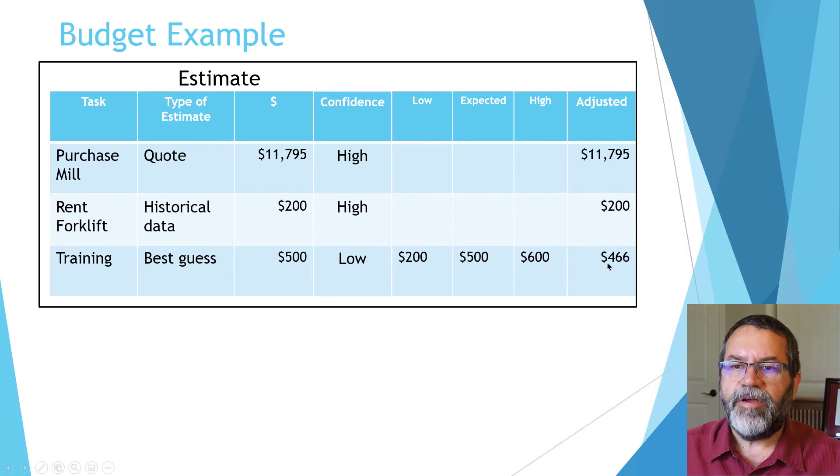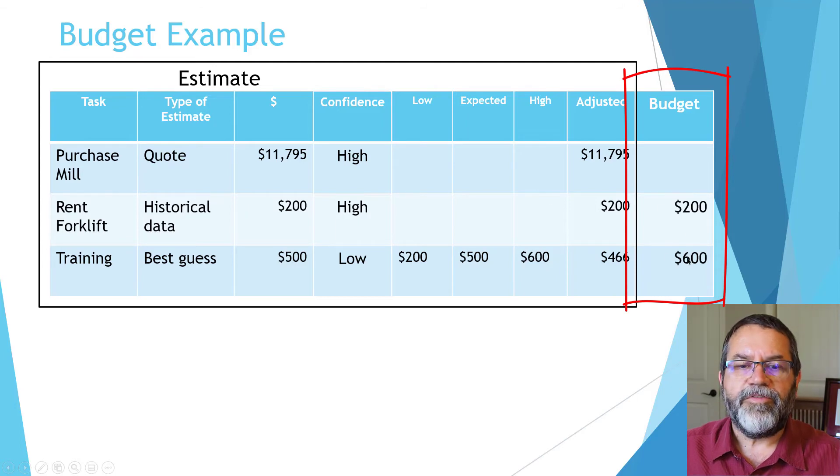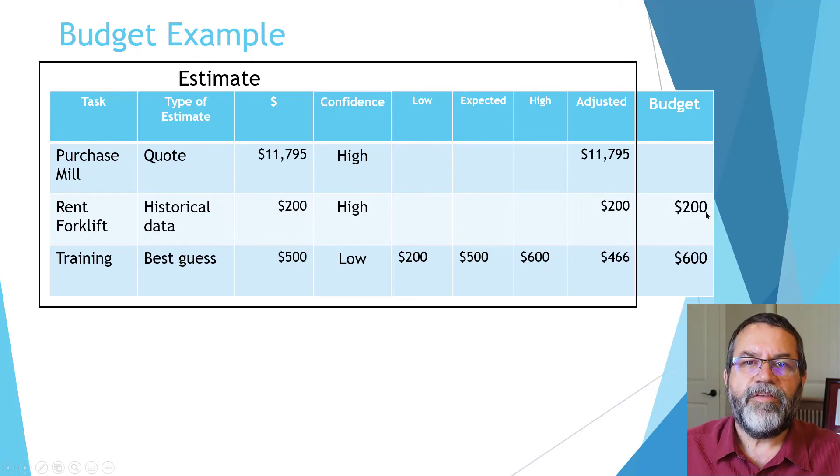We'll take that same estimate with my mill, forklift rental, and training. For my budget, I'll add a column here. The forklift rental is simple—I'll carry across $200. Training, though, I'm going to make another adjustment. The estimate came up with $466, but I know training has been in increasing demand lately. I'm going to go with the high estimate and plug in $600 in my budget.